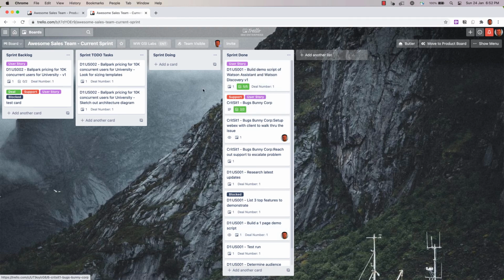And so let's say that we ran into problems and we didn't get these other stories done. The nice thing is with Scrum and Agile is we did produce something. At the end of the sprint on Friday, we can demonstrate these two deliverables. And that's better than having 3 partially completed deliverables or user stories that we can't demonstrate.